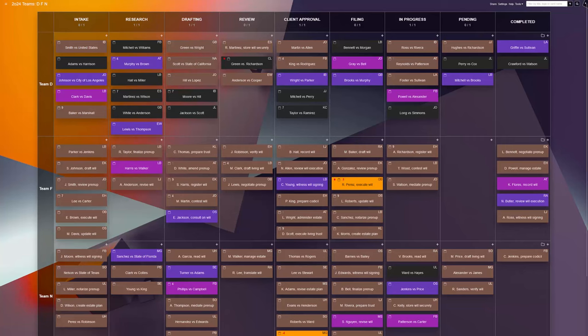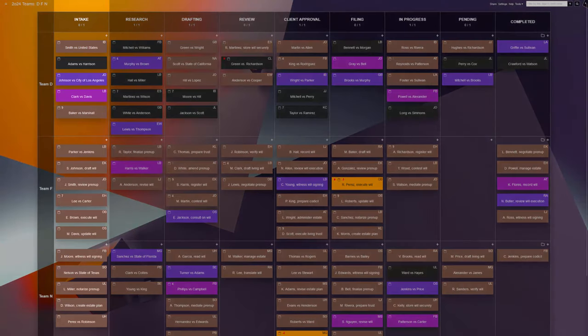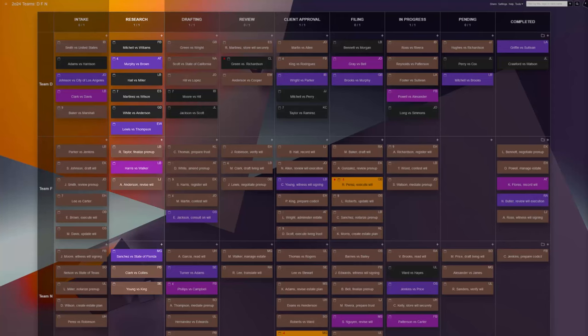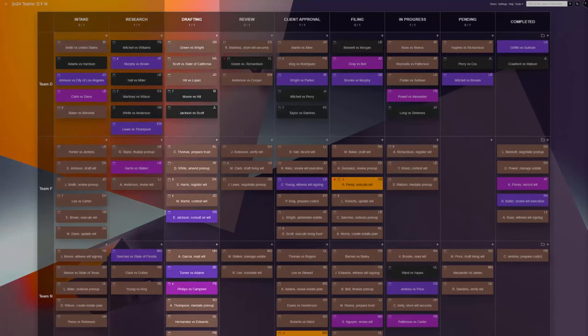For the standard legal team workflow, the columns could be as follows. Intake: new cases that need reviewing. Research: for cases in the information gathering phase. Drafting: the stage of preparing documents, pleadings, etc.